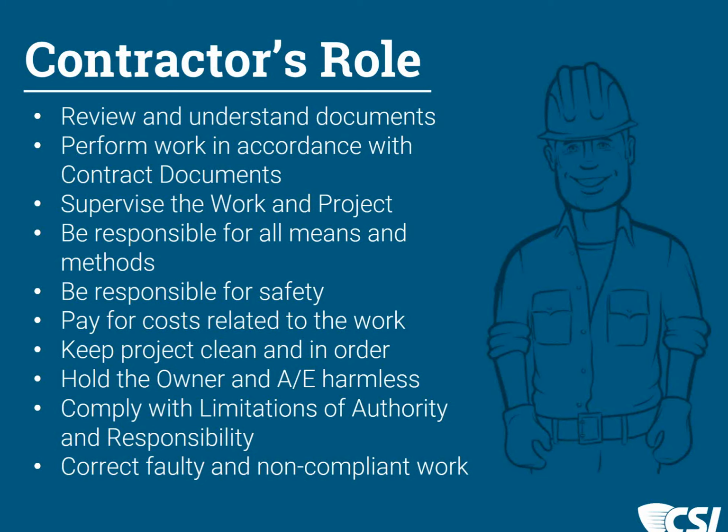They are subject to paying for any corrective work that is necessary that is rejected for non-compliance by the architect or engineer. They're responsible for maintaining the schedule and keeping the work on schedule and moving at a pace that is required to finish the project within the time allotted.